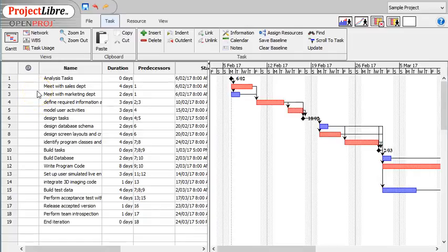So we can do that by recognizing that there are people that may be sitting around that were maybe needed for these sort of tasks, and they may be sitting around waiting for somebody else to work. So we can sometimes take these people and put them onto another task and be able to reduce the duration of the task and the cost of the task in that way, rather than paying somebody for actually not working.